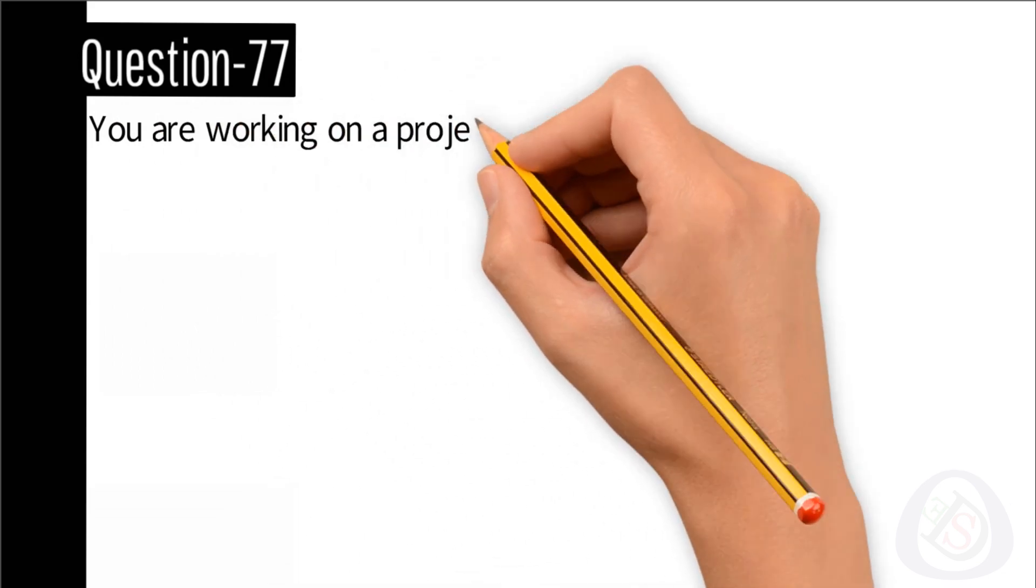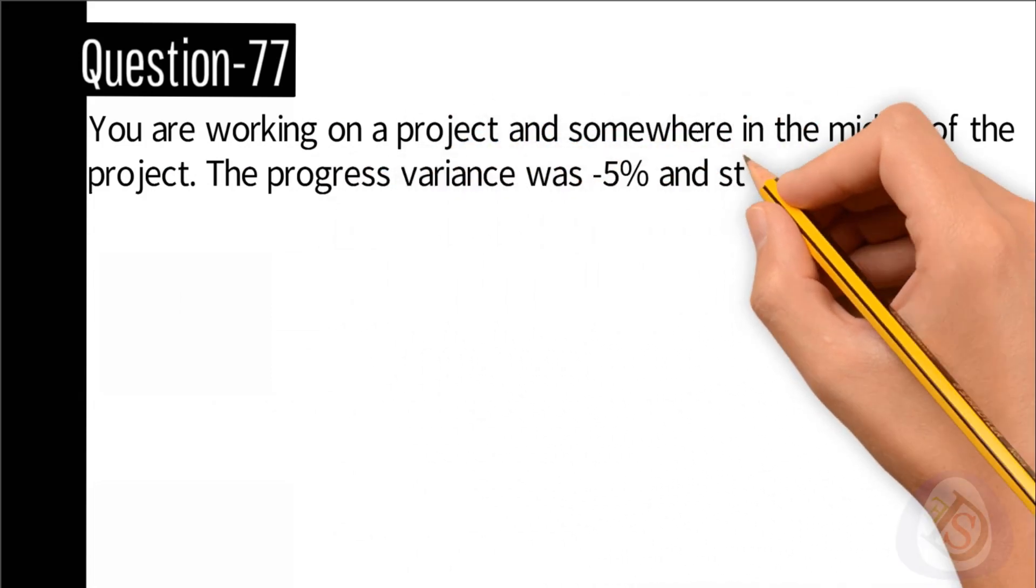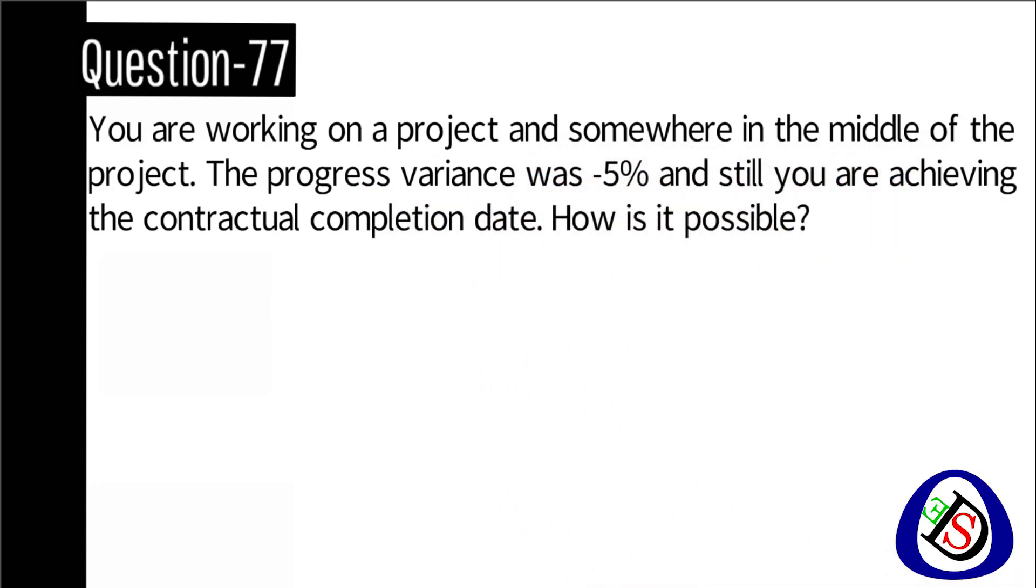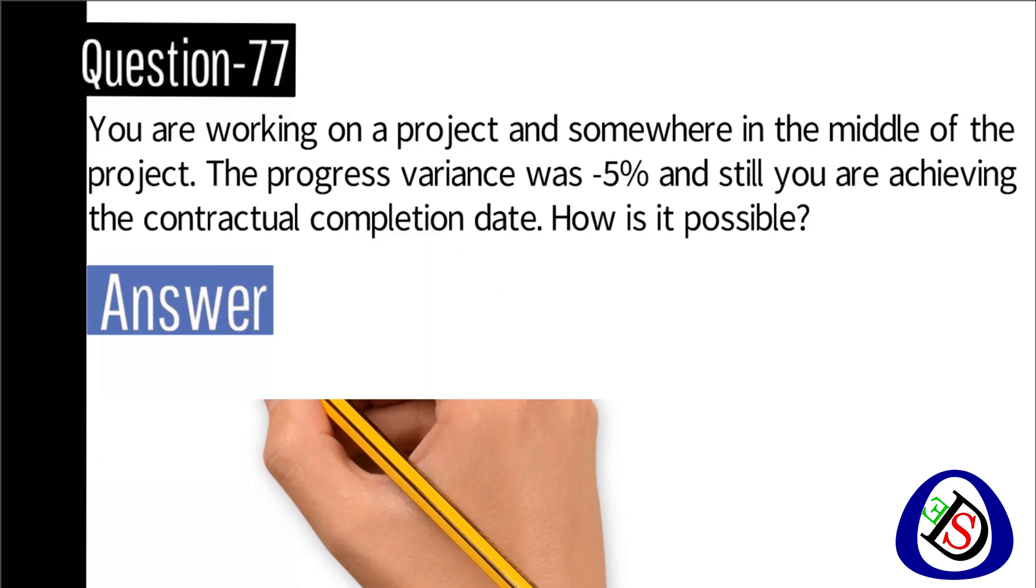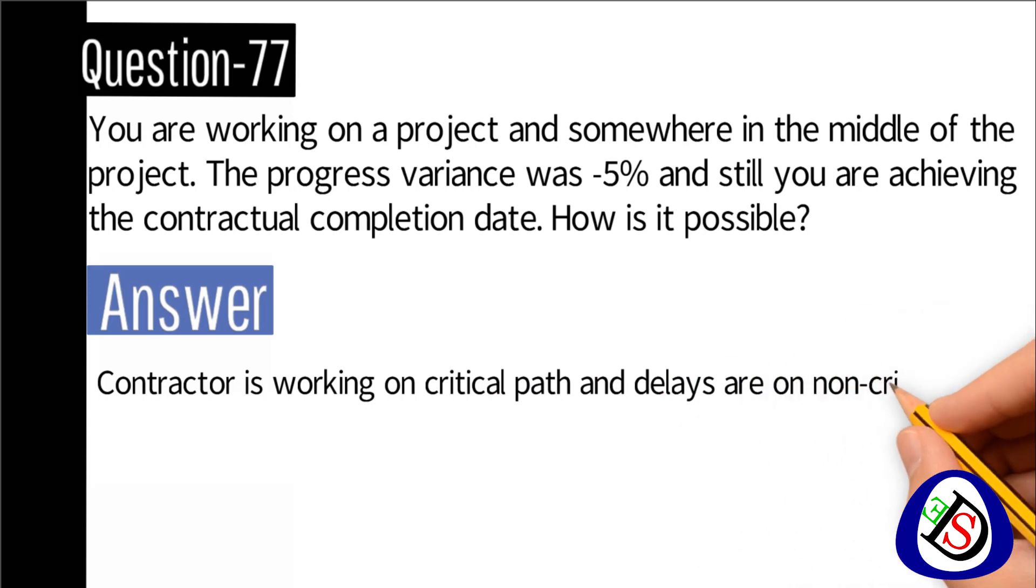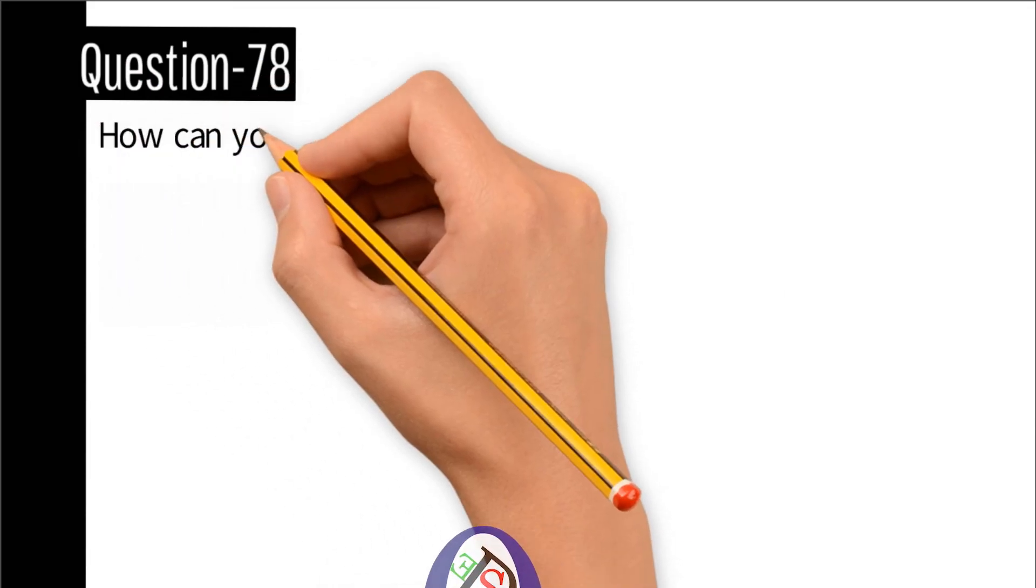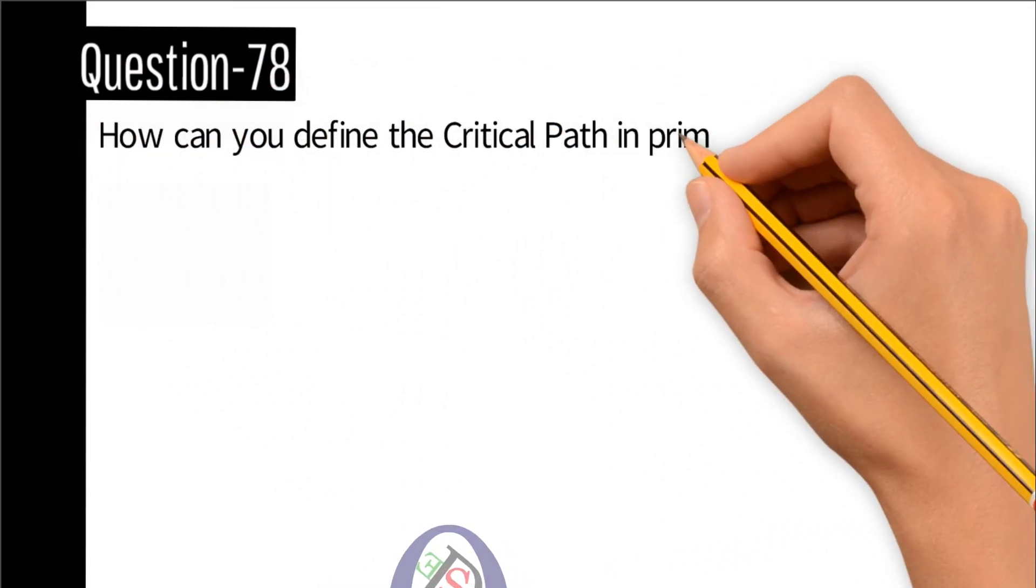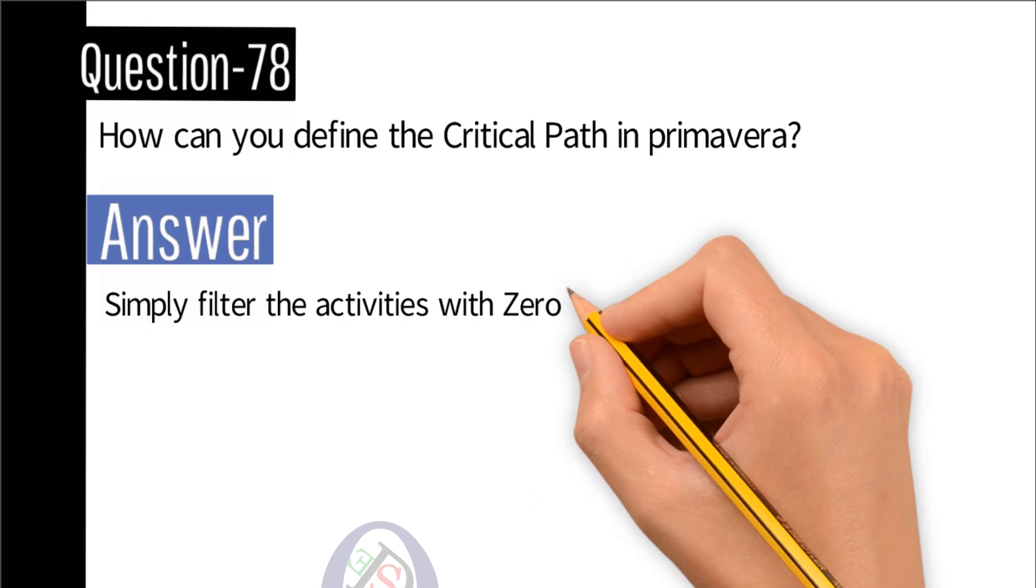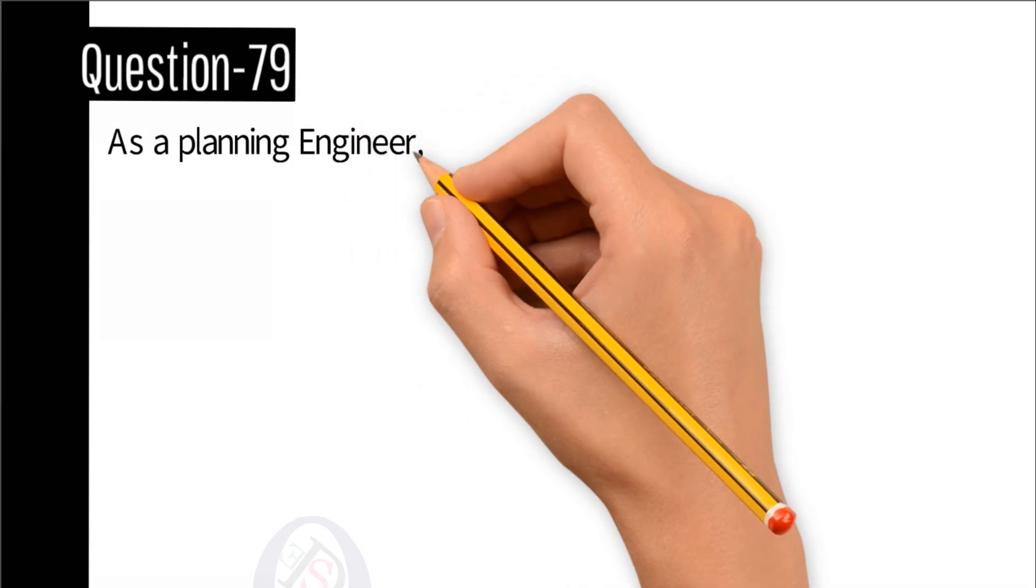Question number 77: You are working on a project and somewhere in the middle of the project the progress variance was minus 5%, and still you are achieving the contractual completion date. How is it possible? Answer: Contractor is working on critical path and delays are on non-critical activities. Question number 78: How can you define the critical path in Primavera? Answer: Simply filter the activities with zero float.